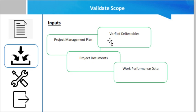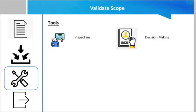Verified deliverables are deliverables that have been completed and checked internally for correctness and quality through the Control Quality process. Work performance data — another input — includes the degree of compliance with requirements and the number and severity of non-conformances.